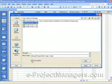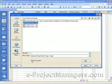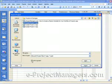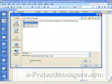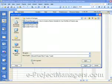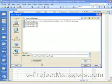And if you're planning on maintaining the project schedules, the individual project schedules, outside of the master schedule, then you'll want to keep this link. But if you're going to maintain the schedules, which you can do, in the master schedule, then you'll want to check this link off. Because if you check it off,